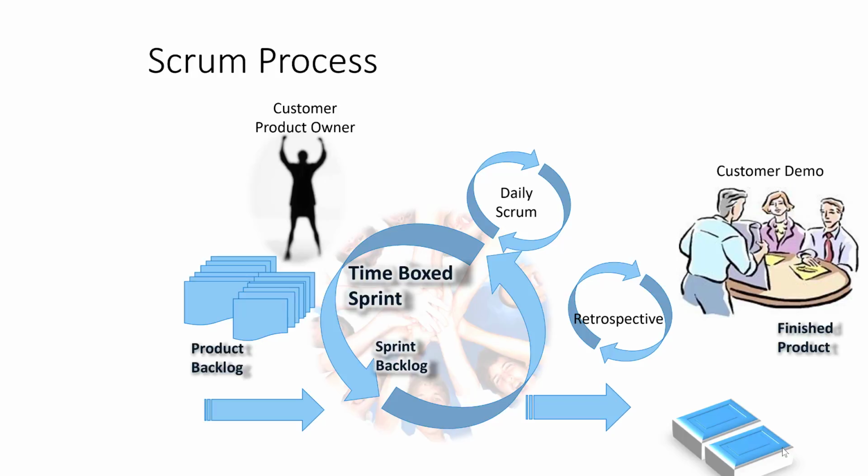And in that retrospective, you will talk about how it went. You will talk about any past things that you were trying out. You will come up with a new experiment, usually, that you will try out in the next sprint. I like to talk about it in terms of experiments because it makes it seem less permanent. Like we're going to try this experiment as opposed to we're going to make this change, right? We're going to try this experiment and see if it works to improve the way we work together. Okay, we'll try that. And then at the next retrospective, you say, how did that experiment go? And are we going to codify it, like use it, or do we want to try another sprint's worth of experimentation, or do we want to drop it entirely? So that's a retrospective. What did we do? How did we do it?